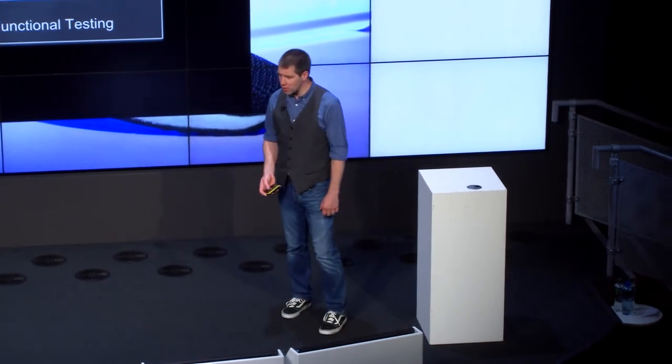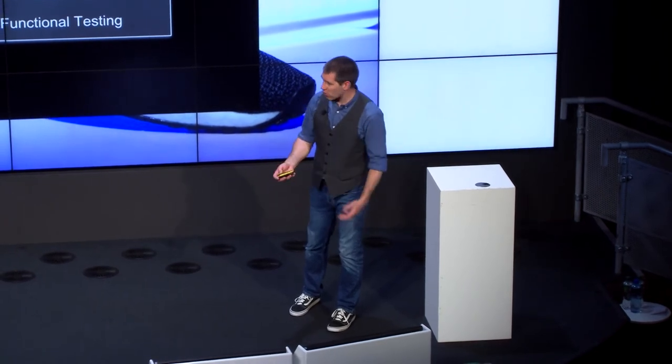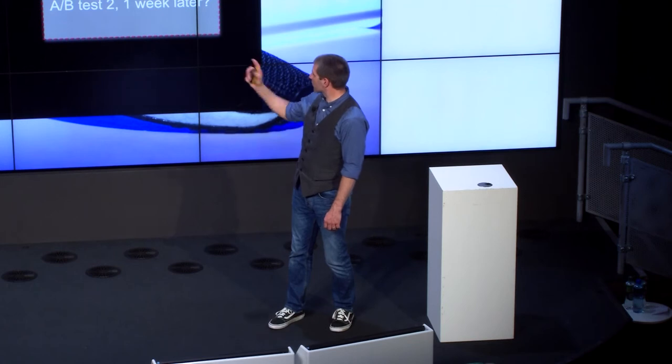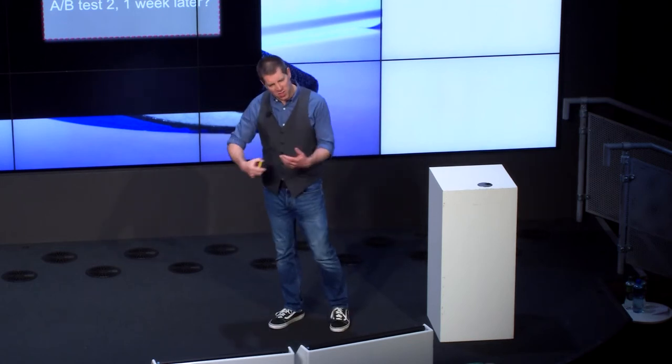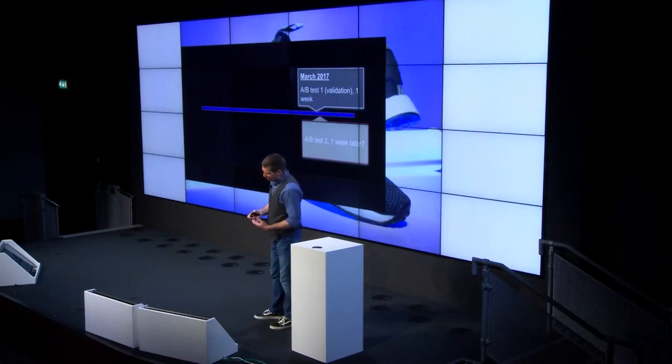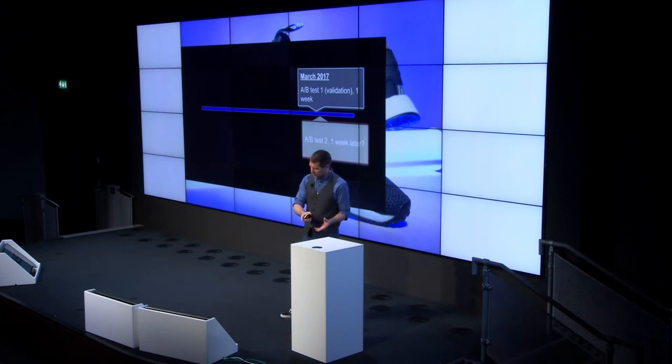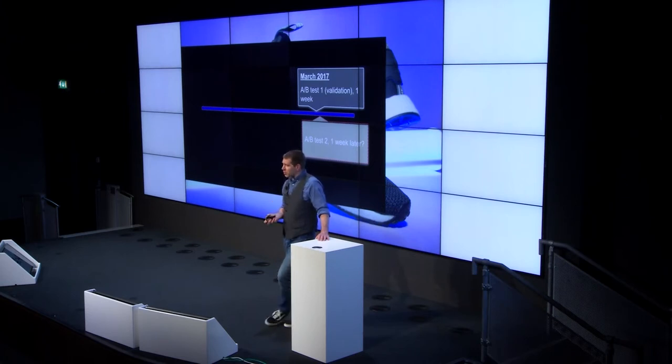And so the plan would be, of course, we'd done a lot of prep work and everything should be going pretty good. And then a week after that, we'd do any quick remediation that we had to do in that middle week, and then go fully live with a 50-50 test. So we're trying to really stack the dice in our favour, or at least make sure we're not creating a design that was going to be too bad, because this was a change that had to happen, could not fail, but very much had the possibility of failing.